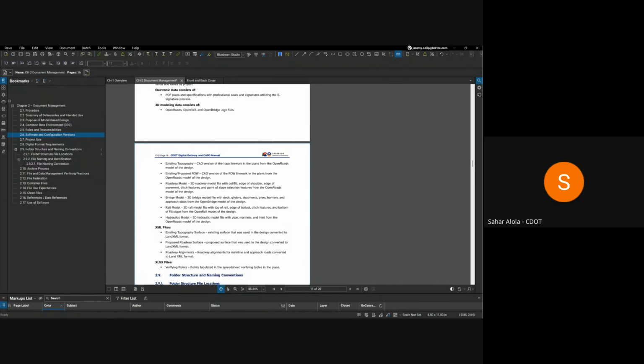Yeah, those are very important processes. Checking the data is very important, especially at the beginning and at the end of construction. The previous quality assurance document used to ask everyone, as a best practice, to get the alignment of the existing and the terrain of the existing, see what's going on with the existing, and cut cross sections. That is the first step before you start anything else. And same thing with the construction, that's part of your QA/QC process. Yep.